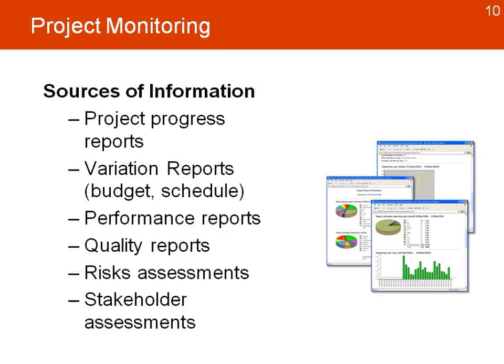The sources of information we use include project progress reports that give us key information about numbers — where we are and how much we've spent — variation reports that look at differences between what we planned and what we're actually doing, performance reports, quality reports, risk assessments, and stakeholder reports if there are changes in the levels of interest and support from stakeholders.